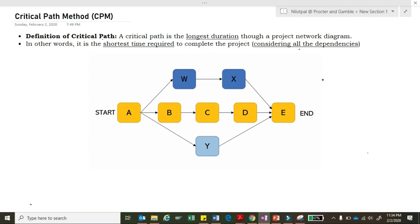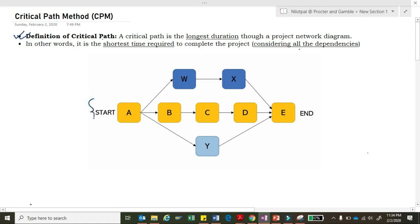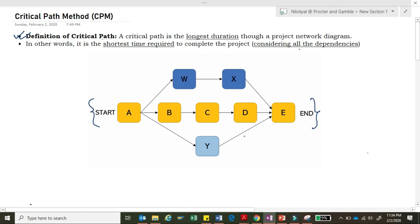We'll start with understanding the definition of critical path. A critical path is the longest duration through a project network diagram. This network diagram has three paths: one path is A, B, C, D, E; one path is A, W, X, and E; and there is another path which is A, Y, and E.